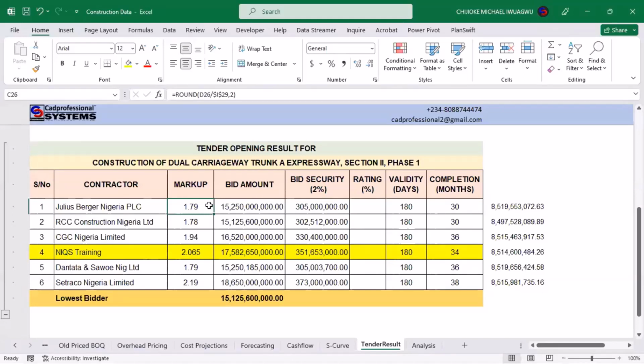When you analyze yourself and see whether there is a way you can bid better than them, you can consider a certain amount which you have established to be the marginal difference between your bid and their bid. You can always offer that as your discount. That way, you will still be bidding ahead of them. But this technique is useful when you are talking about competitive bidding.